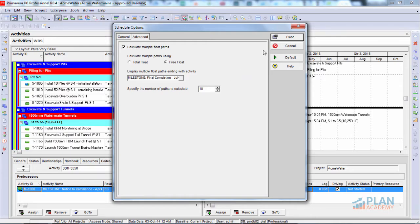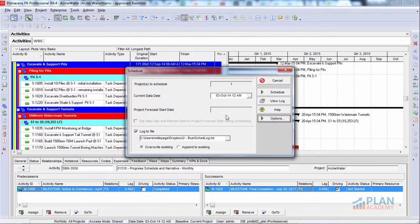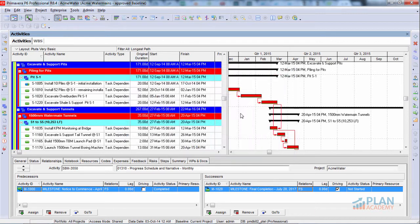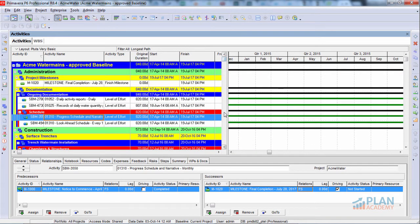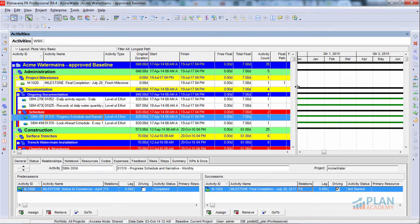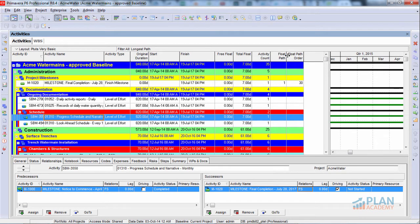Okay, having set that, let's go ahead and close this and go ahead and reschedule the project. Great. Now, when you're working with float paths, there are a couple things that we need to do. First thing, we're going to add a couple extra columns. So I've added these extra columns. These are columns that are specific to float paths. Float path and float path order. So I've added those two. Now, secondly...